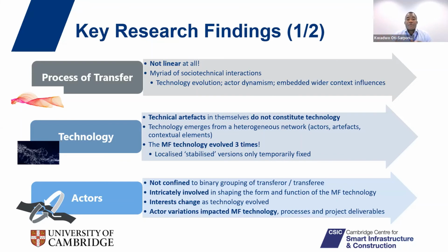And so a number of the foreign workers were removed and replaced by those who were deemed more experienced in the use of similar technologies elsewhere on the continent. So the changes in these actors led to a rethink of how the components were going to be used and how the project teams erecting the buildings were going to be configured around the use of this monolithic formwork technology.